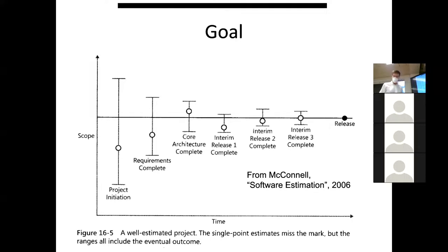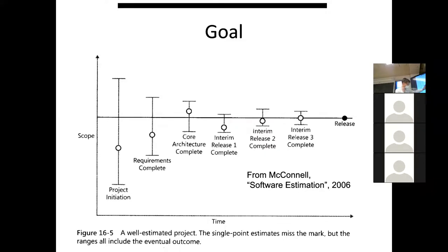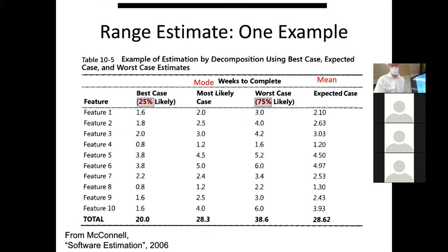Over time you often get more and more certain about how long a project will take, but that's typically matched with less and less ability to do anything about it — the features are already set, much of the work is already done. But you get progressively clearer on timing as you go. Range estimates help communicate this evolving certainty.